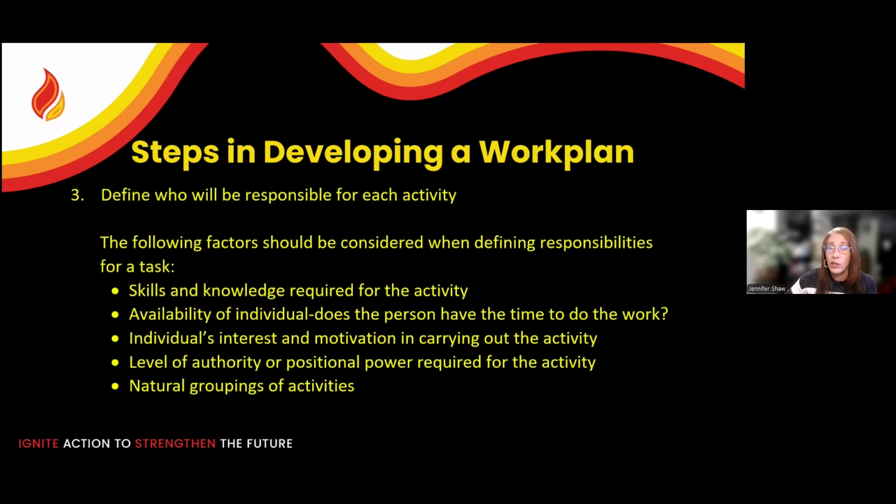Step number three, you define who is responsible for each activity. So you should always think about these different factors when identifying who will be responsible for them. The skills and knowledge required for the specific activity, the availability of the individual. Does that person have time to help support it? The individual's interest and motivation in carrying out the activity, the level of authority or positional power required for the activity, and the natural groupings of activities.